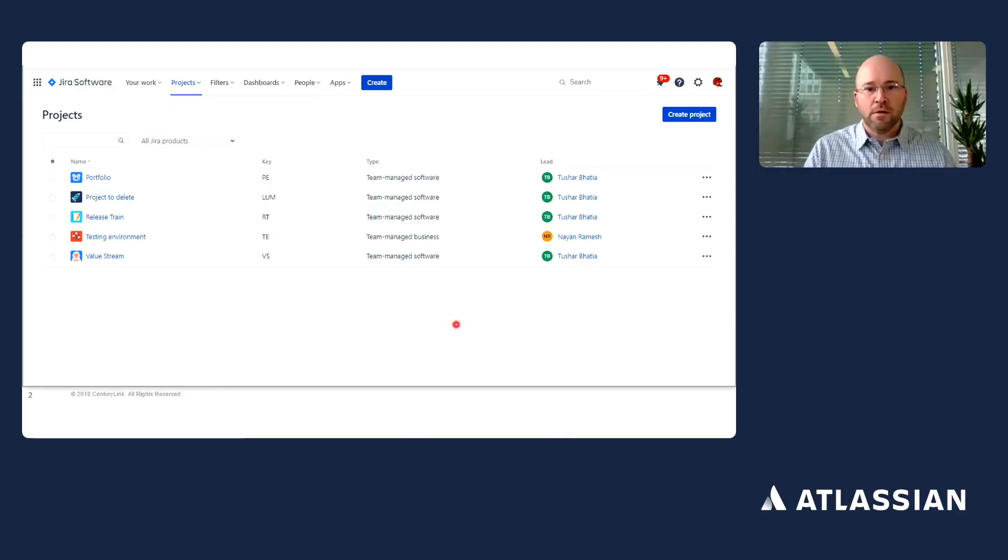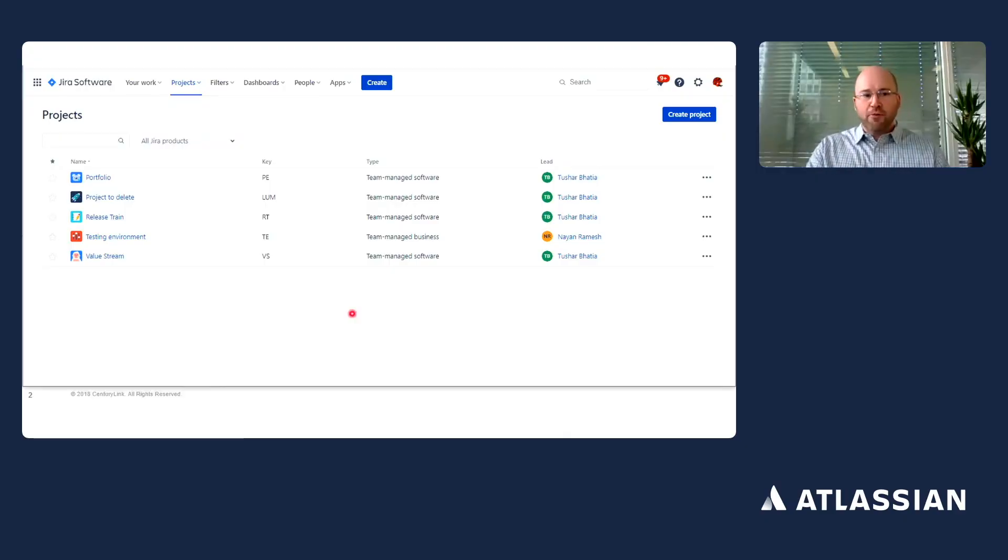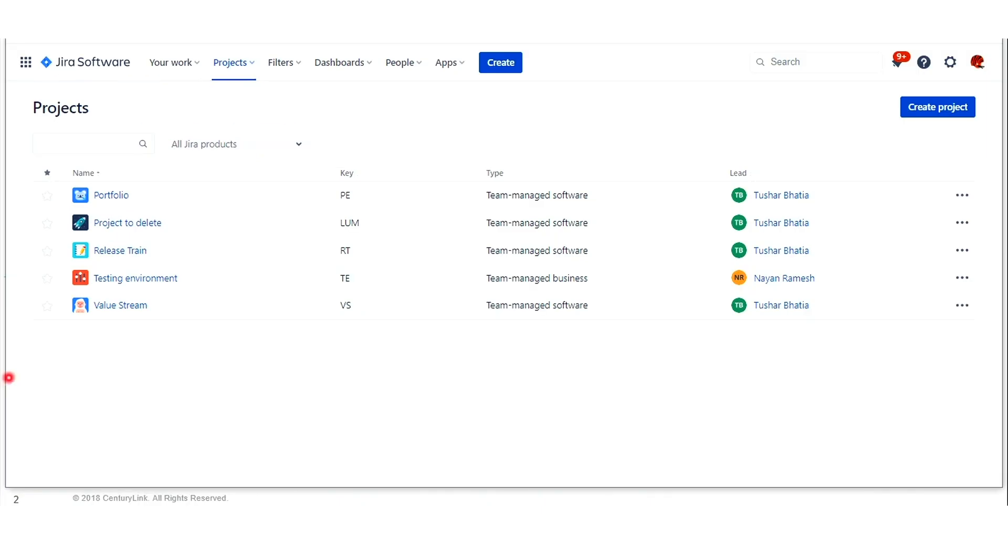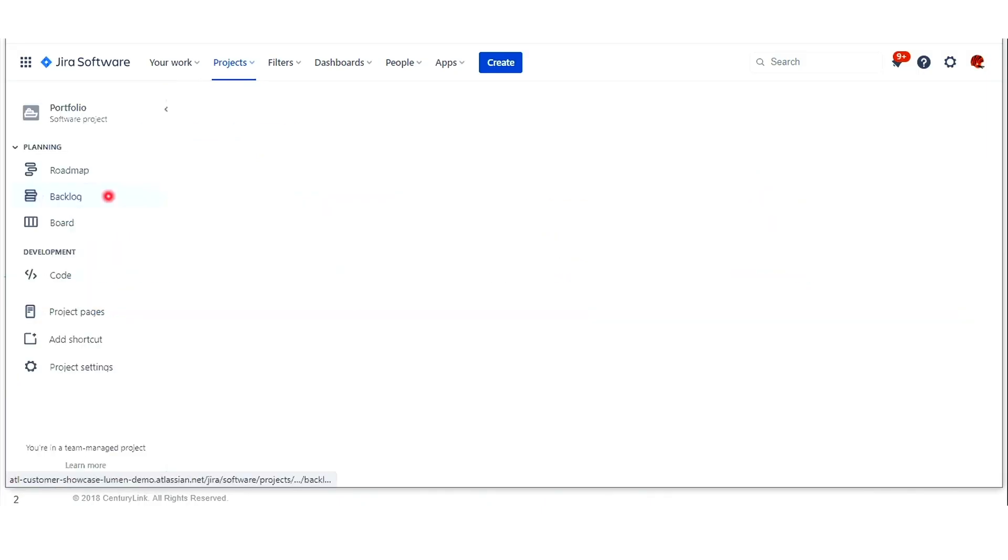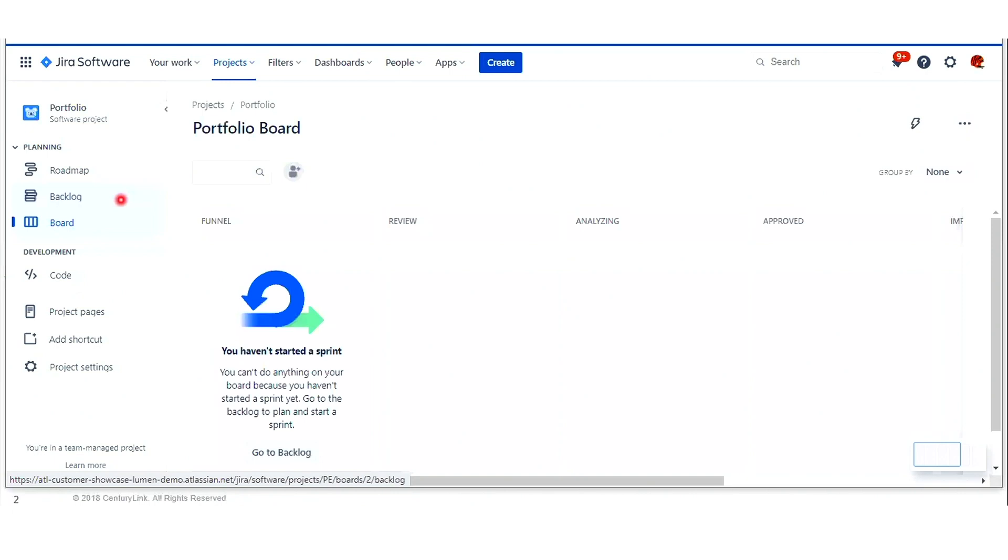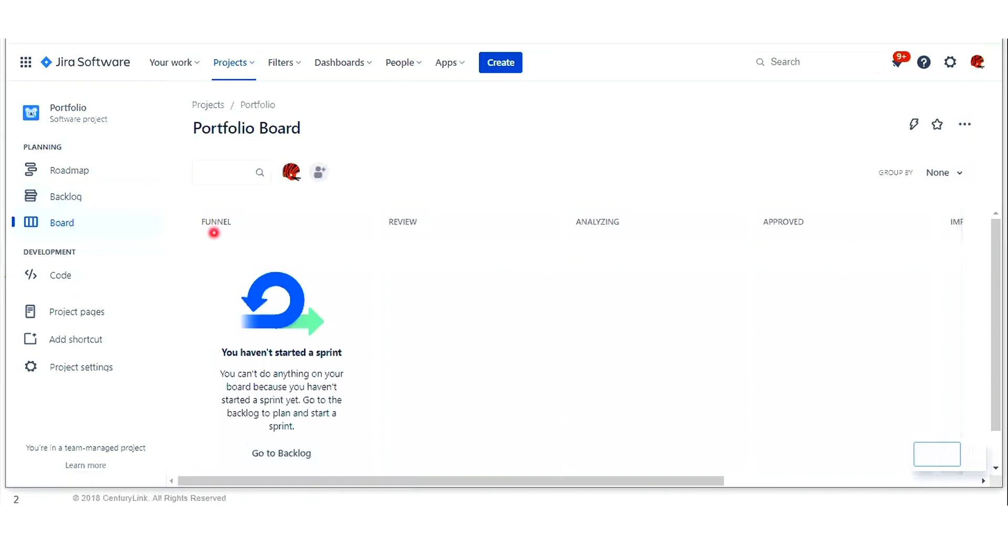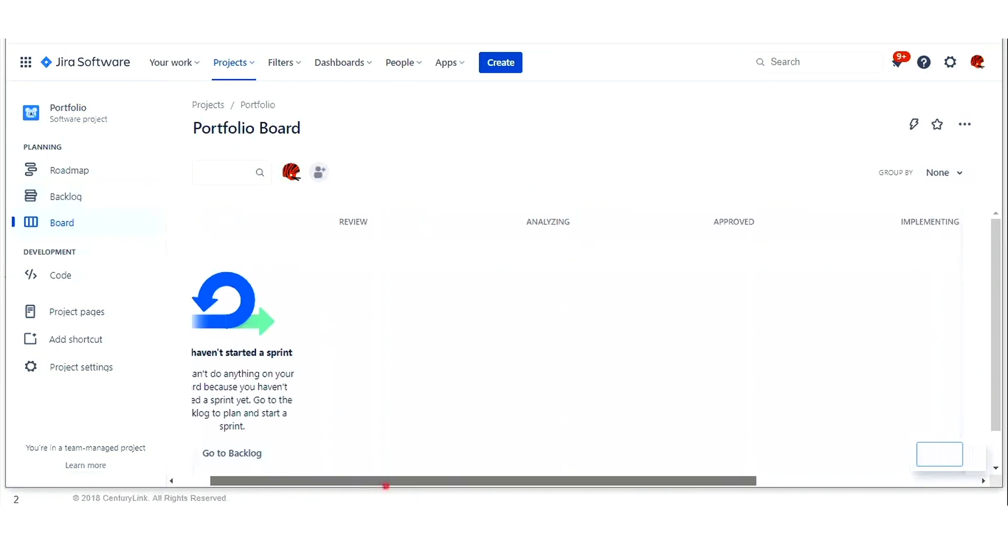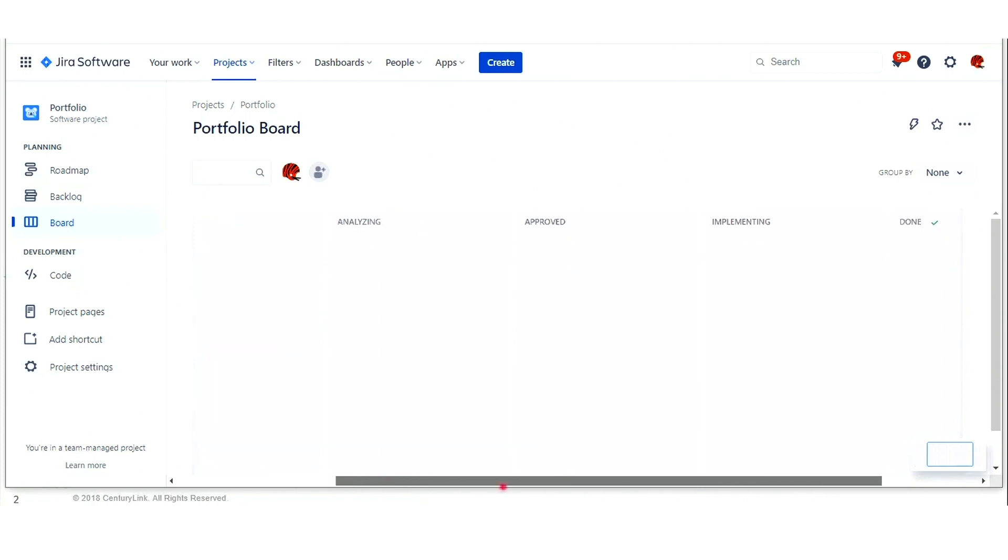As we transition into Jira software, there are multiple projects created. At the portfolio level, all projects have the same workflow. We start our workflow at the funnel level, moving left to right from funnel, review, analyzing, approved, implementing, and done.